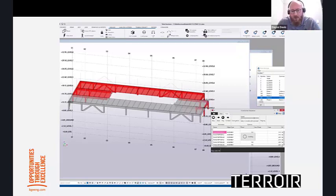You can get this benefit, of course, by a traditional going out to 4 tenderers, but it just means that this happens later in the piece. But it does need to happen with a timber building, which is much different than, say, a traditional building. Generally, the builder doesn't really care where you start because it all has to be done. For us, we have to manufacture this somewhere else and then deliver it to site. So these sort of studies are imperative to understand the complications, the connection details, how the builder wants to put it together could determine some difference in connection details and efficiencies. We want to make sure we're choosing the right products in the right situation.